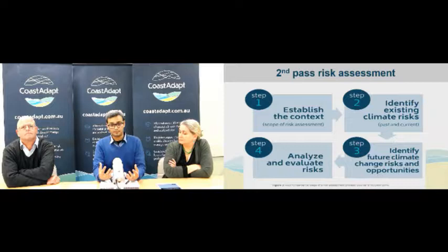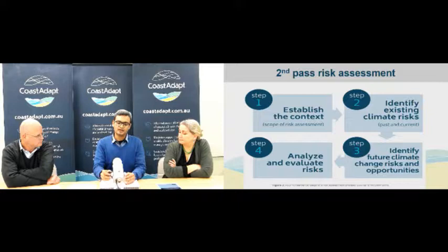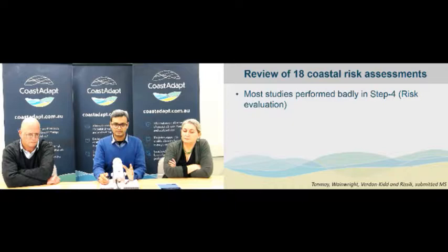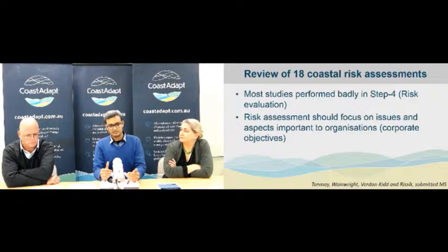And step four is about evaluating those identified risks against certain evaluation criteria. And we often found that this particular step, risk evaluation, has been performed badly by most of the organizations. It's mainly because when you are doing a risk evaluation, those criteria should focus on issues and aspects that are important for the organizations, such as their corporate objectives.